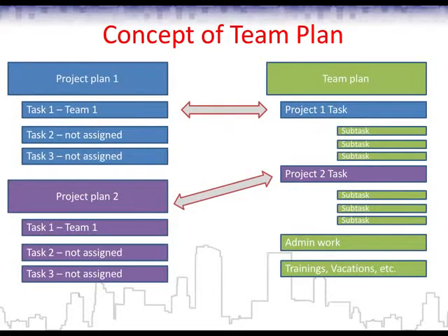And vice versa. If some high priority non-project work is assigned to a team and the team manager updates the mix of the work, and it affects, for example, the project 2 task, like postponing it 1 week later, the project manager should see this information in his plan, but it shouldn't move his plan forward by 1 week automatically.